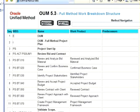Two, you look at the requirements. Then you use UML modeling by starting with the actor, goal and list. Begin by calling this the list of the MOSCOW list. It's still incomplete, yes, but it's iterative. Then you go to your stakeholders. You look at your requirements team, your project sponsor, and you ask them to prioritize this MOSCOW list.